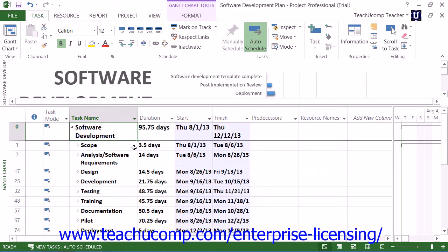However, if you then assign an additional work resource — meaning a second employee — to the same task at a given maximum of 8 hours of work per day, Microsoft Project would recalculate the duration of the task to be 1 day. This allows you to easily change resource assignments to tasks, and then inspect the changes that the additional assignments have on the duration and cost of the project. You can use this information to assist you in accomplishing the required tasks to meet the goal of the project, while balancing the time and cost constraints that accompany the project.